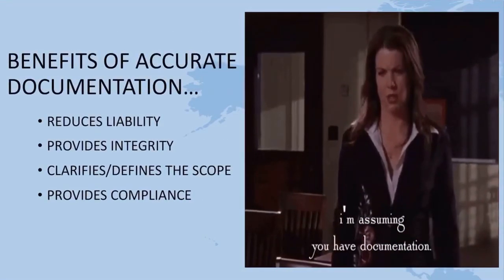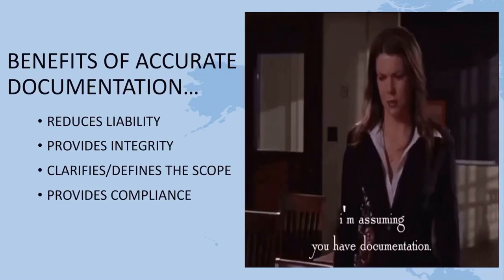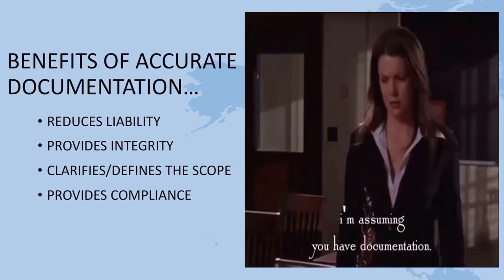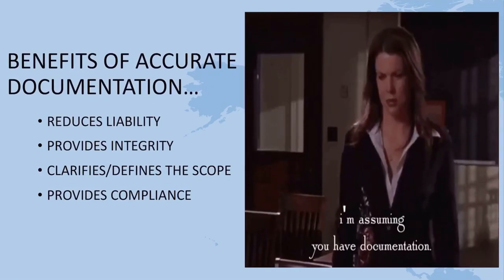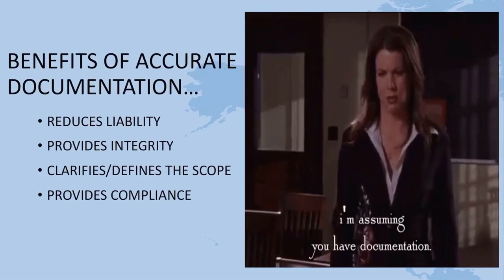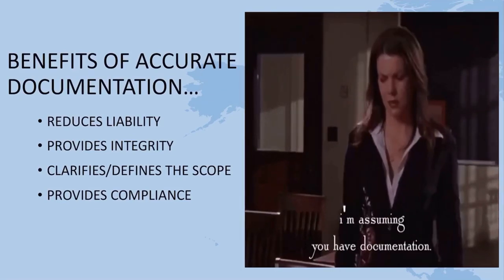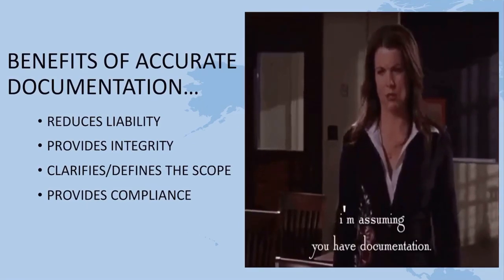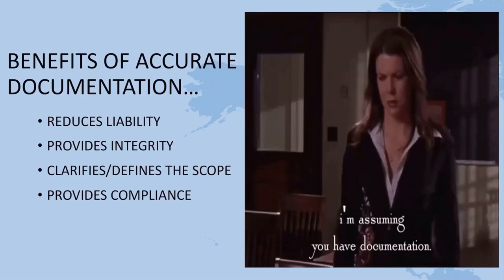The benefits of accurate documentation: it reduces your liability. You're like, well, what liability? Well, what if somebody comes up later and says you tore out some floor tile and it had asbestos? Do you have documentation that you had that tested, or documentation that the building already had on file that it did not have asbestos? So the documentation helps reduce liability.